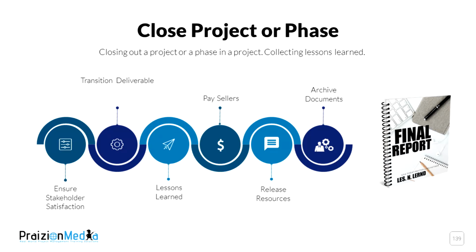This is where we should also make sure any existing claims are closed out. This is where you should also ensure that knowledge that needs to be shared is shared with everyone. This is where you want to make sure that if there are improvements that you observed could happen in your firm, maybe to be captured in organizational process assets, this is where you make sure that that information is passed on to the right people. Hey, we saw a potential improvement. Why don't you improve on these OPAs, organizational process assets, which are really processes and procedures for carrying out work